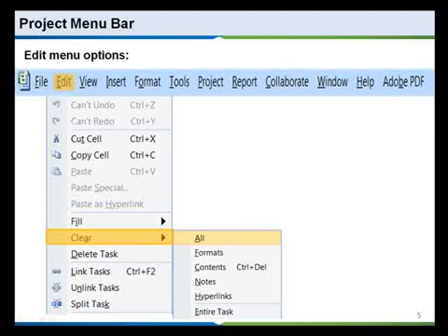The other key thing is when we're talking about tasks, we're looking at activities, scheduled activities, everything that's created in your activity list, which will become part of your work breakdown structure. Microsoft Project refers to scheduled activities or activities as tasks. So just remember that when we're talking Microsoft Project and we're talking tasks, we're referring to those activities in our activity list and also the structure of our work breakdown structure.